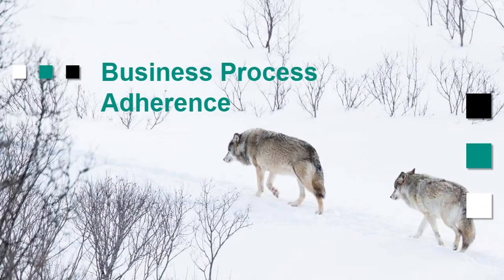I don't really love what they've done in the client, but they do have some of the checks. Our tool goes way beyond those checks because you can add your own business process checks, such as whether you've got your mandatory codes assigned. There are a lot of additional items that we can evaluate.